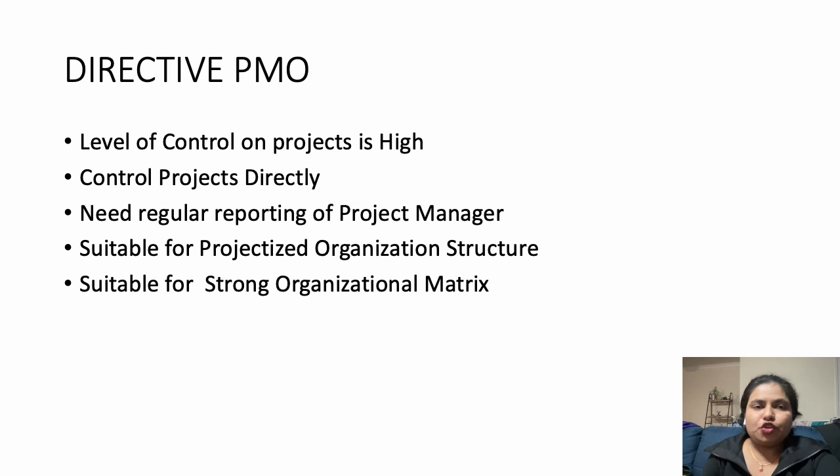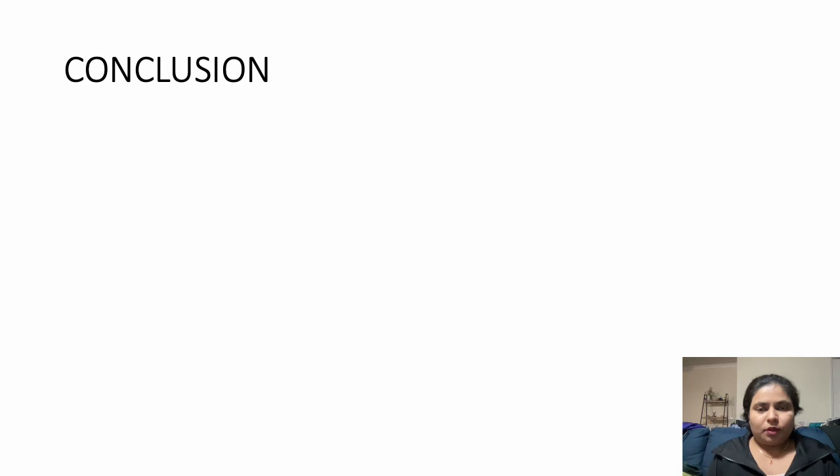Thus, the directive PMO helps in achieving a high level of consistency across projects because of the single authority and reporting structure. It is best suited for organizations with a strong matrix or projectized organizational structure. Finally, to conclude, based on the organizational structure and the project requirements, we will select the required PMO.